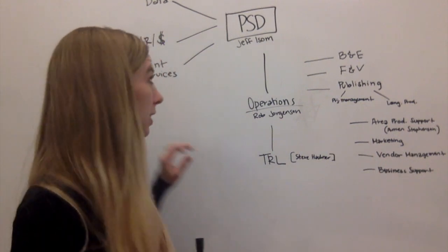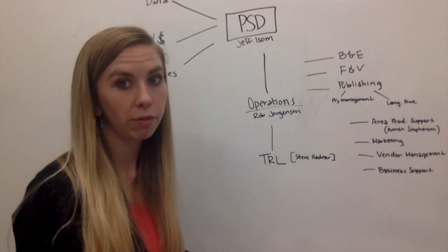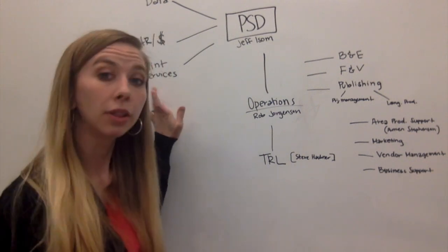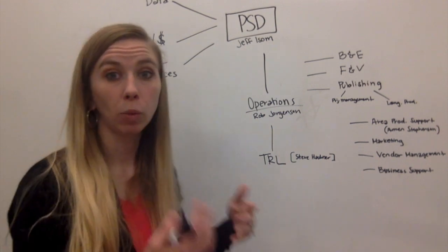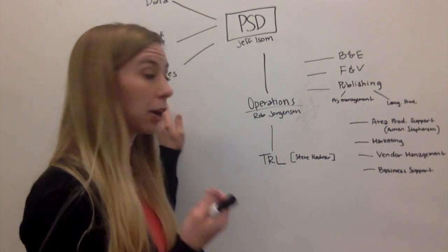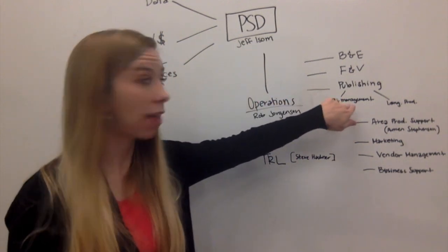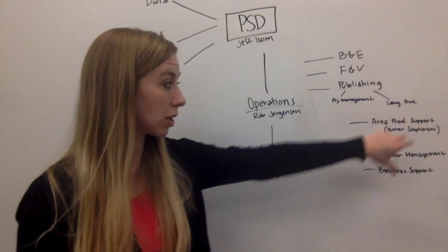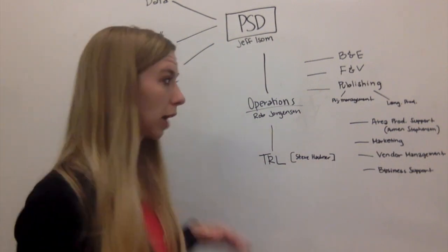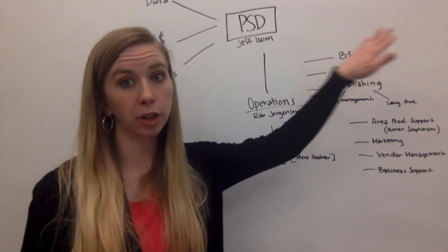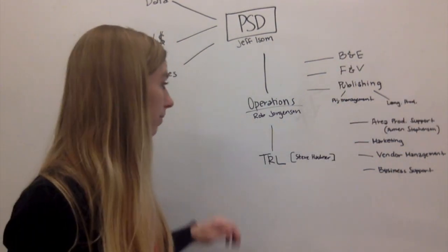A lot of what happens is client services. The program manager role, if you hear me reference that role, they're the team members on these teams. A program manager works with a client, they get a request for a job, they come and work with a project manager, and that project manager pulls resources from all of these groups to complete the work. So that's the workflow right now. Program manager, project manager, production resources, and then it gets delivered back to the client.